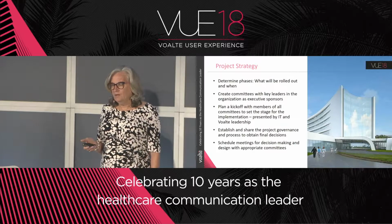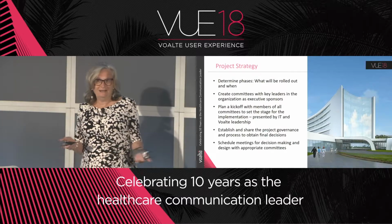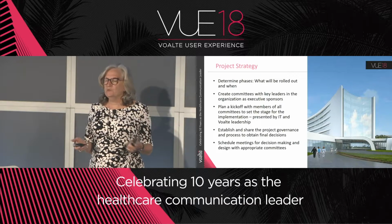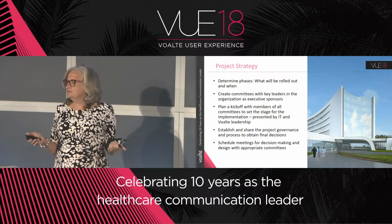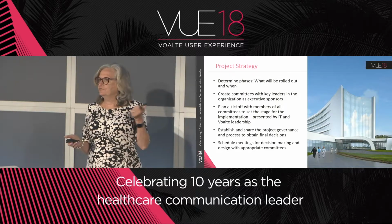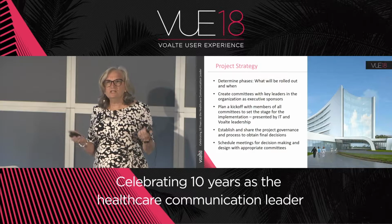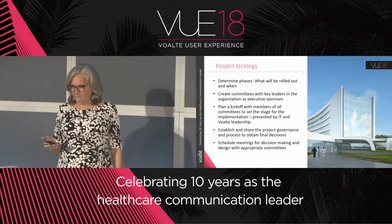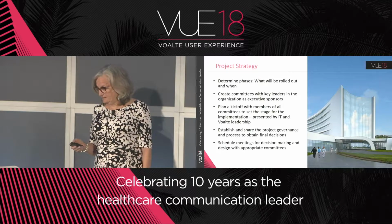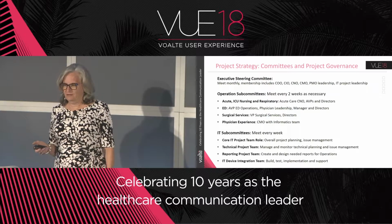We planned a kickoff, and what was different with Vocera, we made them be a part of our kickoff. So it was an IT kickoff with Vocera. We both had sets of slides. We reviewed, we established the governance. We set the same message throughout the organization. What IT expected of all the leaders in this organization and our educators and our directors of nursing, we set that stage, not from just an IT platform, but also Vocera. And they saw how it's going to function and saw how it's going to work for them. And we told them what meetings they were involved in, who are the key decision makers, and how things would be escalated. So the first thing, of course, you have to have your executive steering committee.